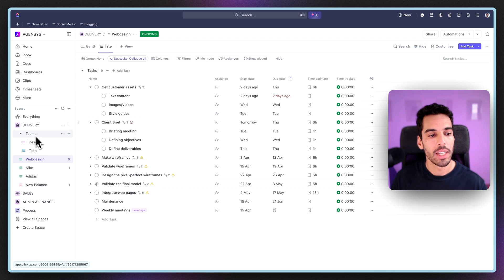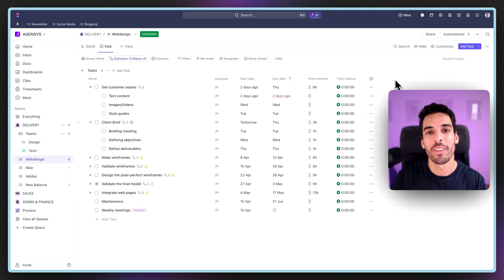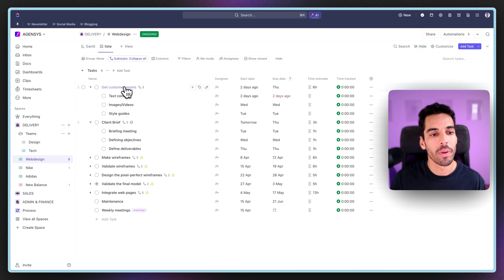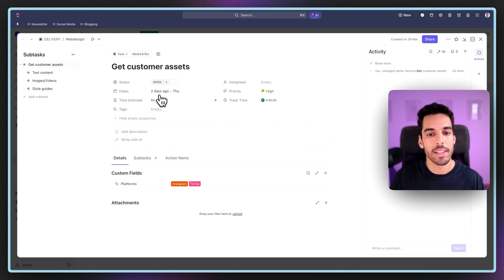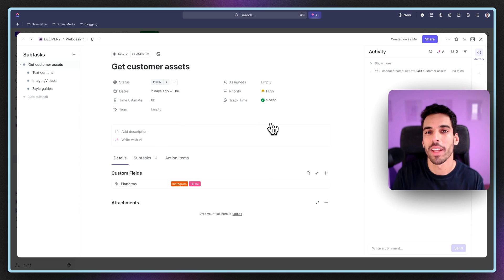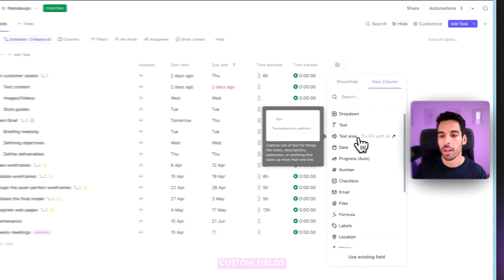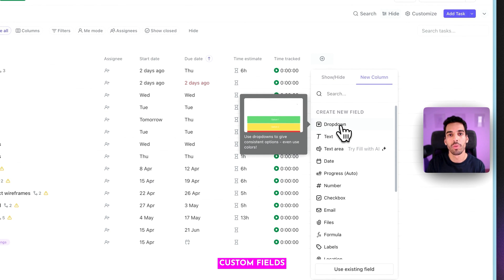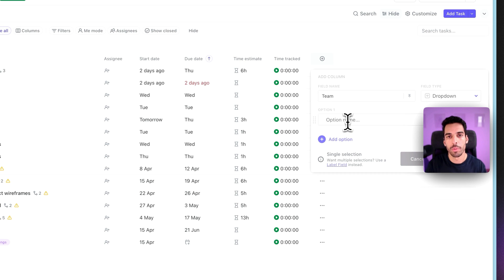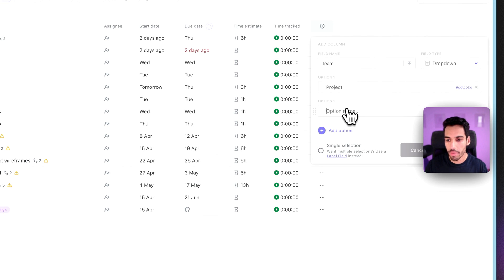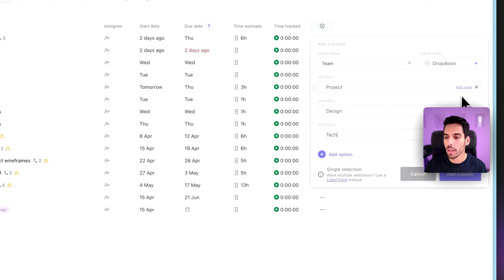There's also a team space, and I'll show you what it's used for. The first thing we're going to do is create a few custom fields. What makes ClickUp very different is that you can track quite a lot of custom information. So here we're going to track the teams that have to do each of these tasks. We're going to create a dropdown and name it 'Teams'. In this specific web design project, we have a project manager, a design team, and a tech team. We can even add some colors to make it fancy. I'm going to save it.